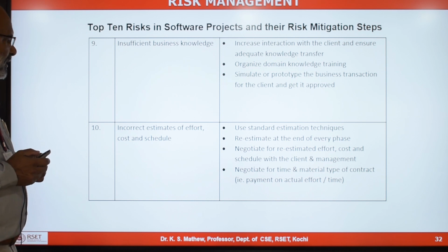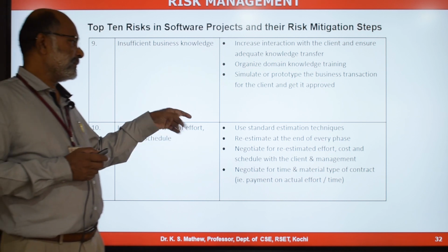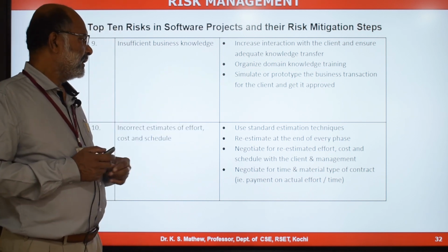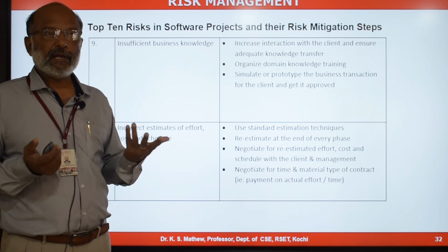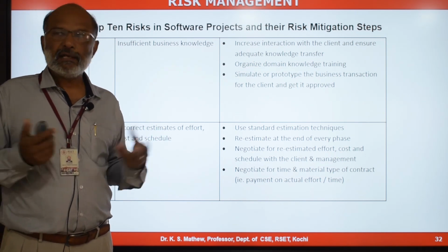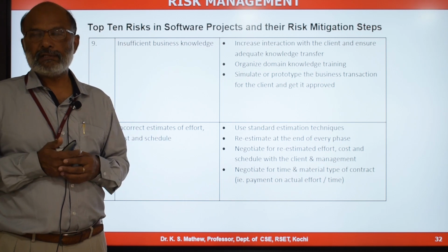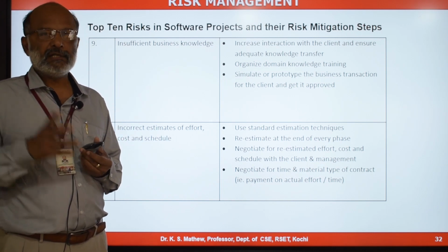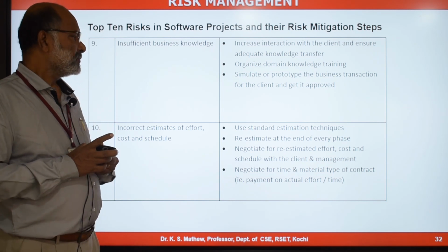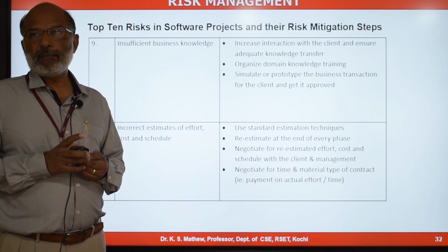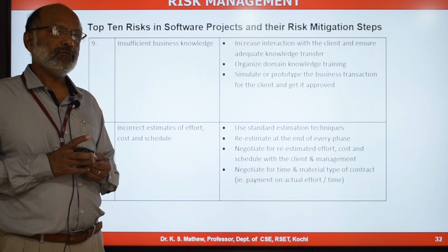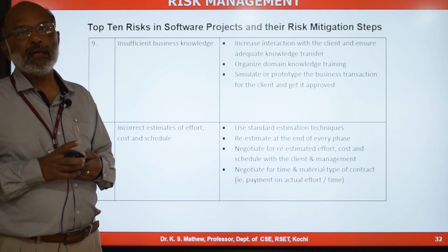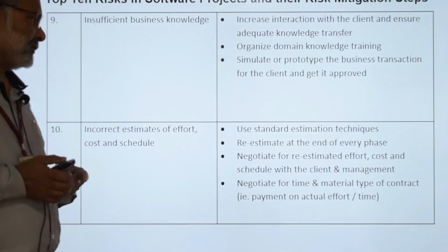Incorrect estimates of effort, cost and schedule. This is a project management related risk. Use standard estimation techniques. Many organizations may not have standard estimation techniques or the skills for doing them. So they may be using expert judgment, which is the most unrealistic way of doing estimation. So train resources, train team members on doing appropriate formal estimation techniques, which will help in getting accurate estimation.